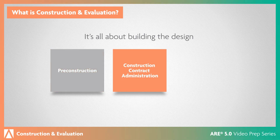Construction and Evaluation continues through construction contract administration, including site observation and administrative procedures such as shop drawing review, payment application review, determination of construction progress, and responses to non-conforming work.